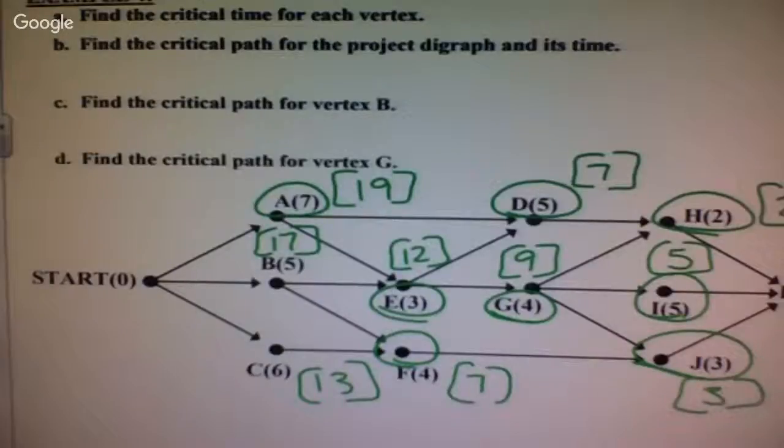Look at all of your options. I thought it was because the parentheses were big. That's why I think, because the 5's bigger than the 3. No, you always want to go off the total time that you're getting. So be careful with that too. You don't want to do D because D takes 5 hours and E only takes 3. You're looking at your total time when you're backing up.